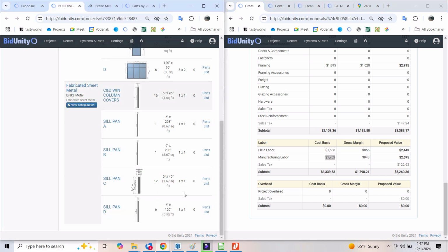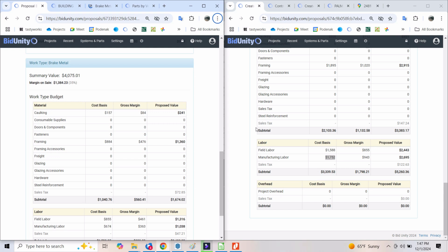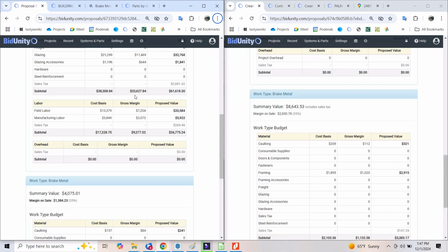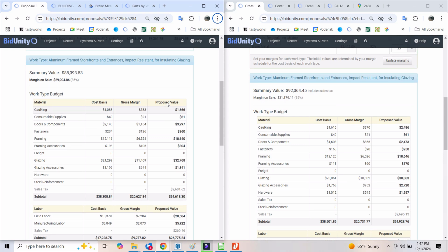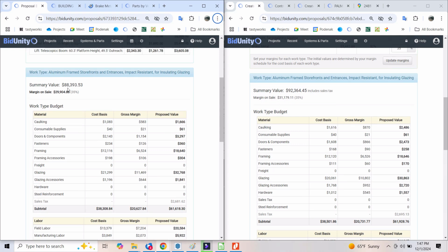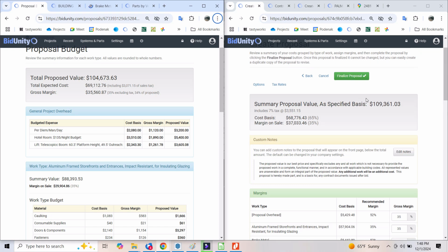We're not including all of the bends, and what we want to do is include all of the faces. So that's 4,600 of difference. If we look at the storefront, looks like I am another $4,000 of difference in the storefront. So I should be 9,600 more.